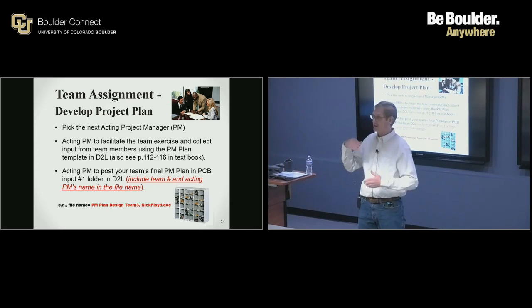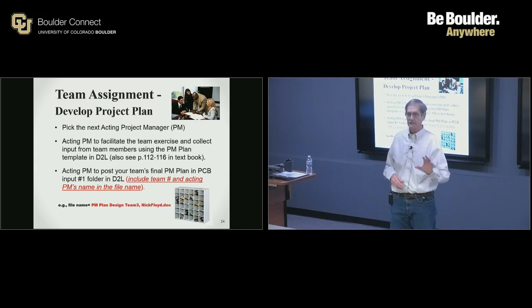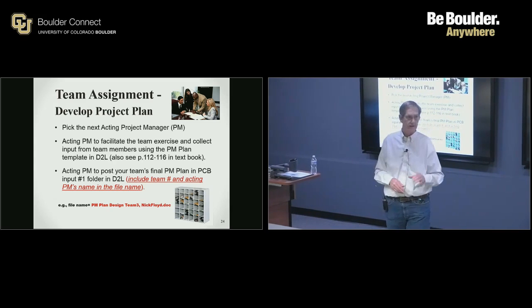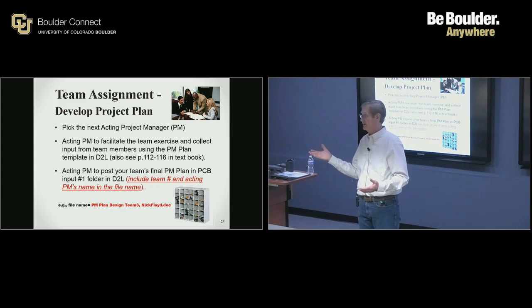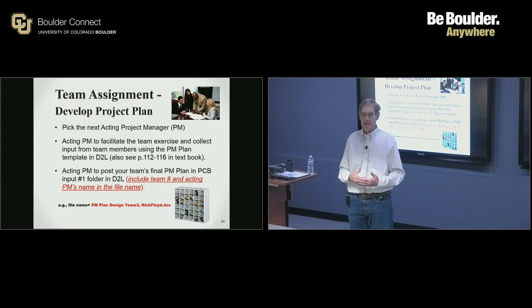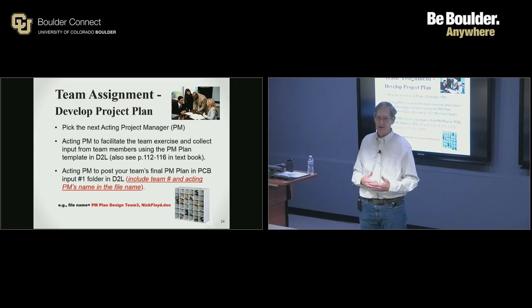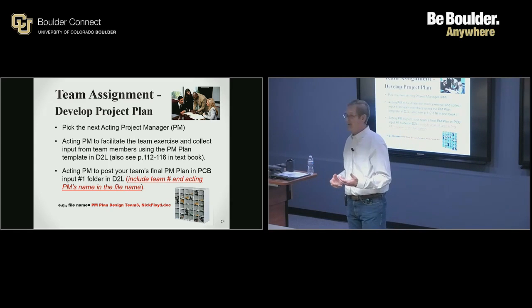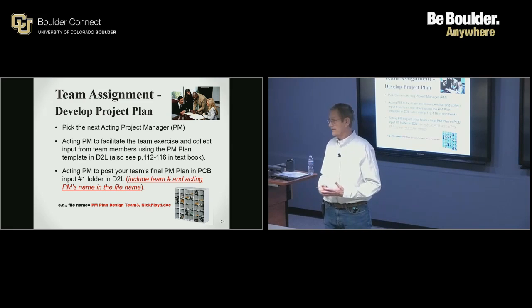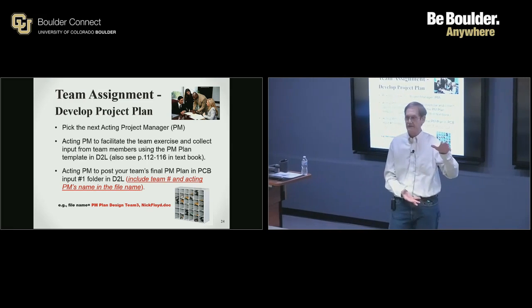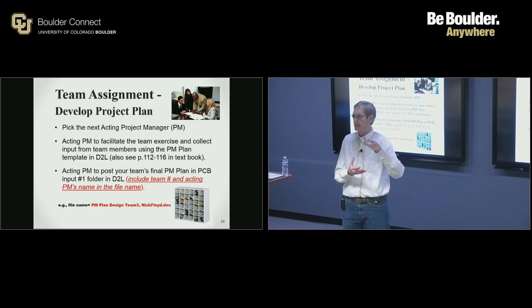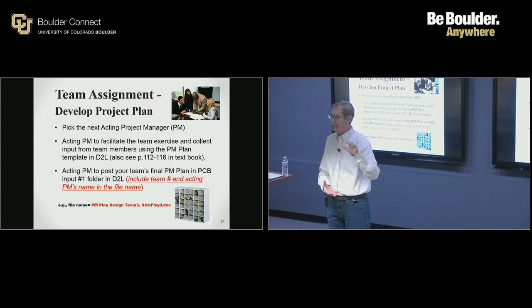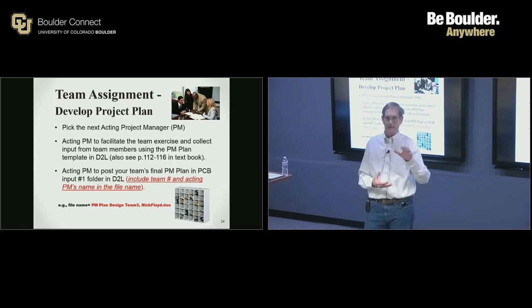And then next week we're going to roll up our sleeves and actually get into the work breakdown structure. We're going to start breaking the project into manageable chunks or categories of work. For example, on the fundraising team or on the build team, volunteers. The assumption is we need to do this on a budget, so volunteers from within the community would be a great resource for us. One category of work for the build team and the fundraising teams is that you're going to develop a volunteer management plan on how we're going to manage the volunteers.